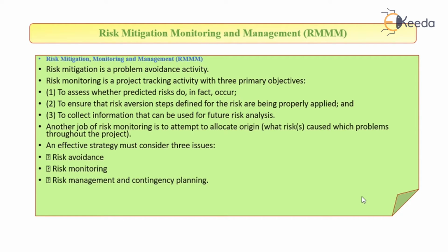Another task of risk monitoring is an attempt to identify the cause of the risk, or the root source from where the risk has occurred. If it is a technical risk, it could be addressed in several ways, like training the team members or increasing the capacity of the servers or the technical availability in terms of hardware, software, and other resources. An effective strategy must contain risk avoidance, monitoring, management, and contingency planning.